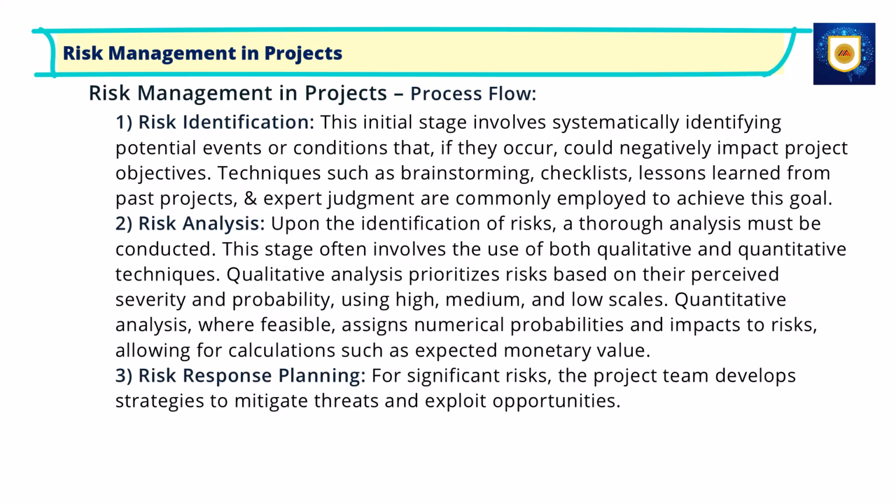2. Risk analysis. Upon the identification of risks, a thorough analysis must be conducted. This stage often involves the use of both qualitative and quantitative techniques. Qualitative analysis prioritizes risks based on their perceived severity and probability, using high, medium, and low scales. Quantitative analysis, where feasible, assigns numerical probabilities and impacts to risks, allowing for calculations such as expected monetary value.